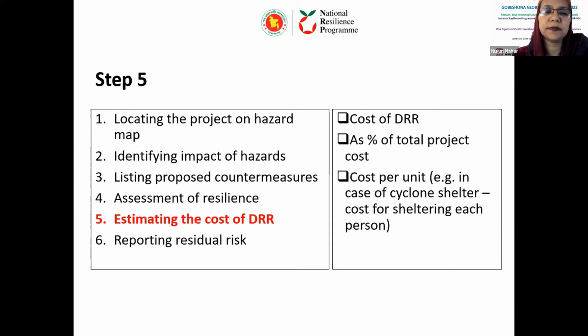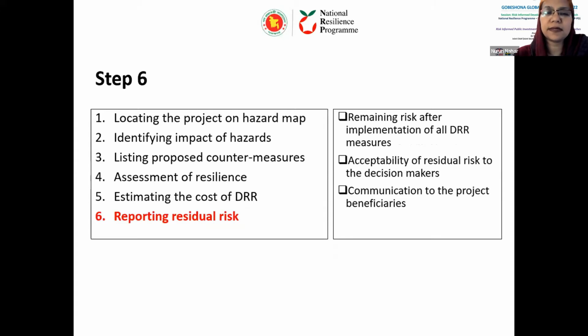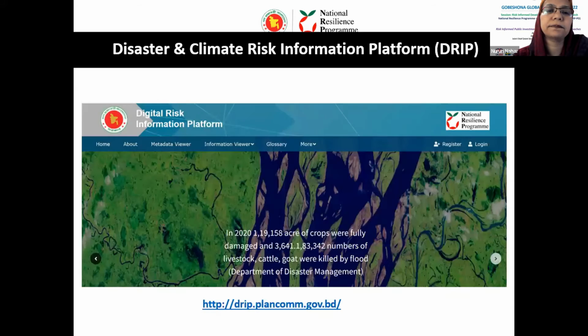So this is very important, to have all these things in the assessment and incorporate it into our DPP. And then, as I mentioned, it will report the residual risk, that is the risk remaining after implementation of all DRR measures, and whether it is acceptable to the stakeholders in the project area, and also how it will be communicated to the beneficiaries, both men, women, and the people who will benefit from the project.